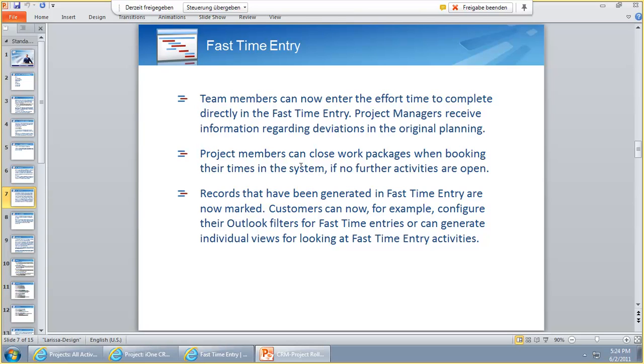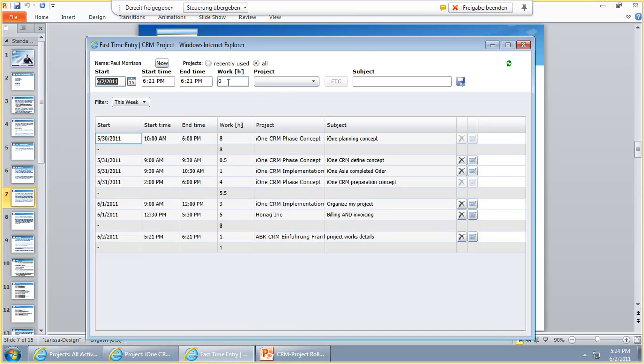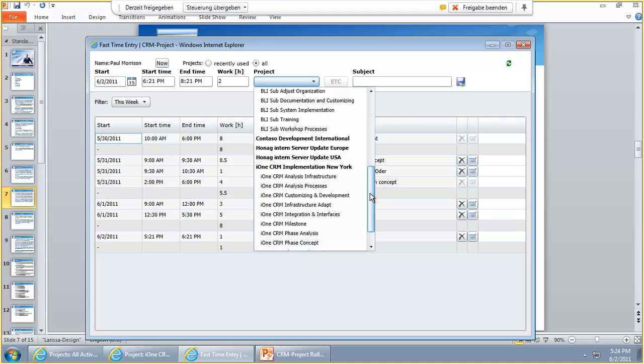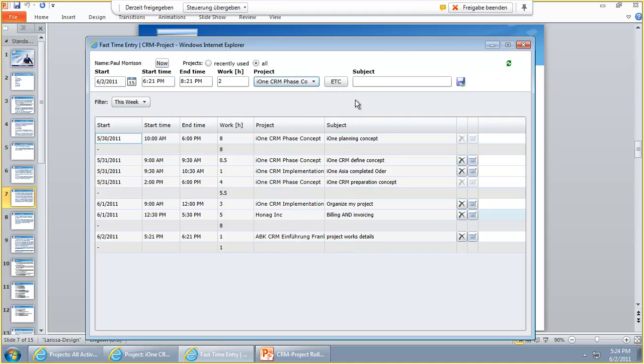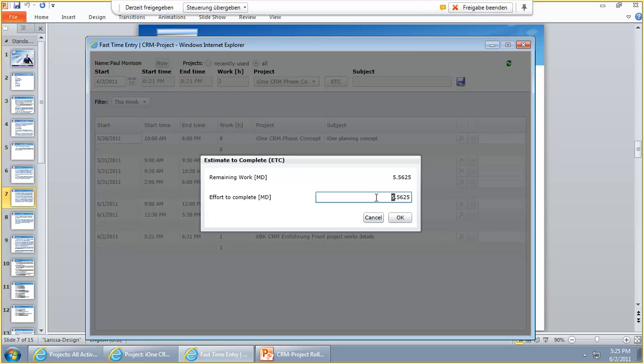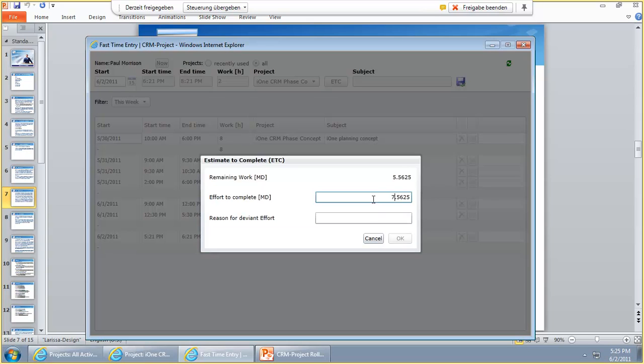Let me show you the Fast Time Entry feature for Effort to Complete. Let's do a new time entry here on this day. I go to i1 CRM phase concept and now you see there is the ETC button, Effort to Complete button. If I open it up I get information how much man days in work is left there. I see I have 5.5 to 5 man days left. Now you can tell the system, oh I know I have to work there a little bit longer so 5 days will not be enough. I choose 7 days and then the system asks me for a reason because I have a very different effort. I tell the system more complicated.